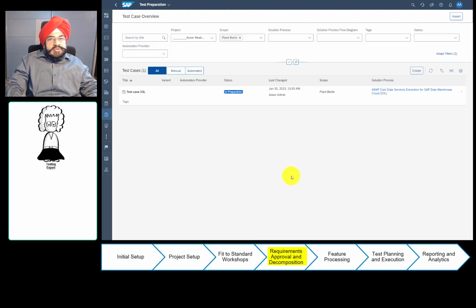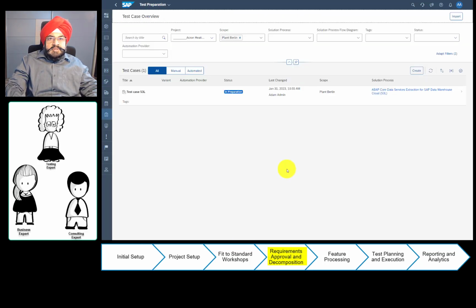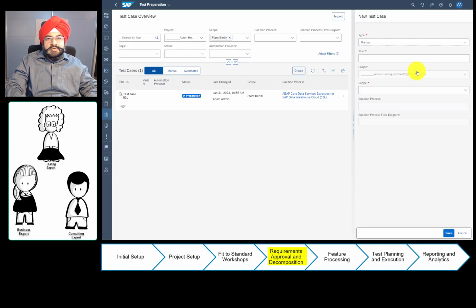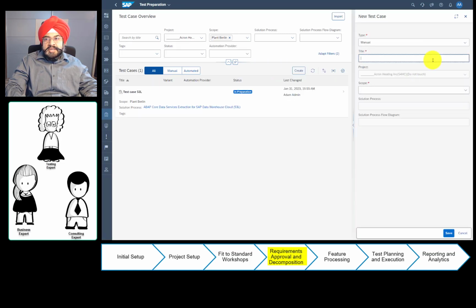And now let's proceed to testing. So now let's see how the testing process works. The testing process starts in parallel with development, and the advantage of SAP Cloud ALM is whenever you scope a process, a skeleton of that is created that helps you in accelerated creation of the manual test cases. So I have scoped a process BKJ, and let's see, can I quickly create a test case for that. So let me save this.